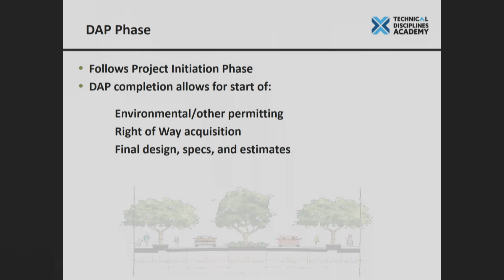So again, it follows the project initiation phase, and then when you're certain and you've got that high degree of confidence, you can say you're a DAP, and then other activities can move forward. Your environmental and other permitting, your right-of-way purchasing and acquisition, and you can move forward to your contract design documents. So that's kind of an introduction to DAP and some of the things that we're going to be doing leading up to DAP.